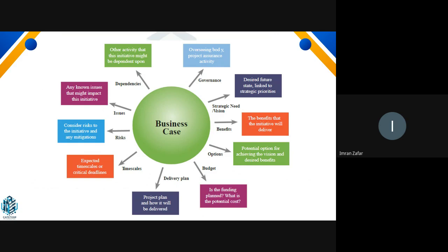And obviously, the business case will also tell you what kind of benefits you are trying to achieve. Some timeline should also be there. Benefits, and what will be the timeline for getting those benefits. A high level or milestone level timeline can also be included in your business case: at what milestone you will be delivering the benefits to the organization. And obviously strategic need: what strategic need is this fulfilling? So there are a lot of things that can be part of your business case.